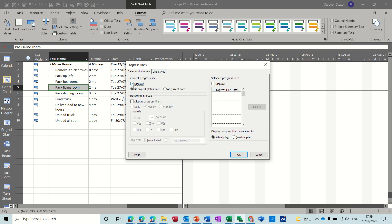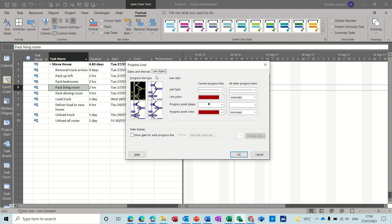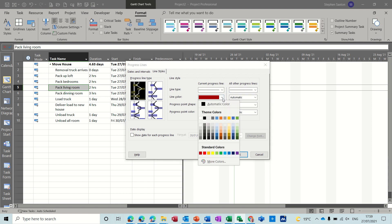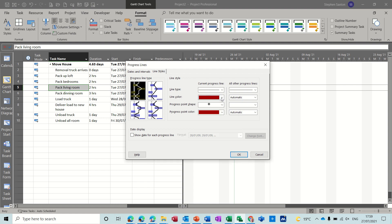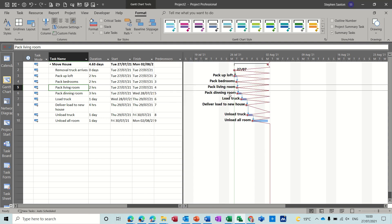So display at the status date and I can change the line style if I don't like that. So I can change the line type if I want a different line style and then all other progress lines can have a different style. Line color if you think it disappears into the background too much, you can change the color and all the different ends and starts to a progress line as well. So if I click OK to that you can see the progress line is not great because based on next Monday everything according to that is delayed.